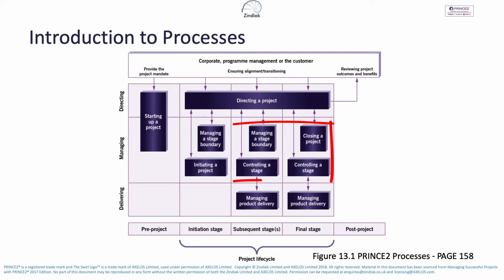And if we continue to delivery, we have one or more delivery stages. So on the diagram there, you've got 2 delivery stages, a first delivery stage, and then a final delivery stage. But we could just have one, or we could have many. We could have 10, 20, 100, 1,000, and the number of delivery stages will be dependent upon how risky the project is. The more risky, the more uncertainty there is, we're likely to have more and shorter stages. The more certain, the less risky the project is, we're likely to have fewer and longer stages.